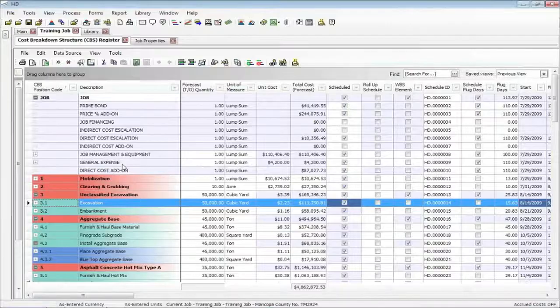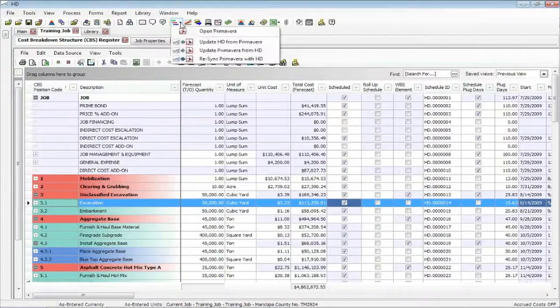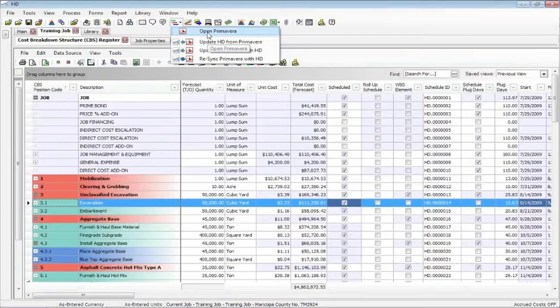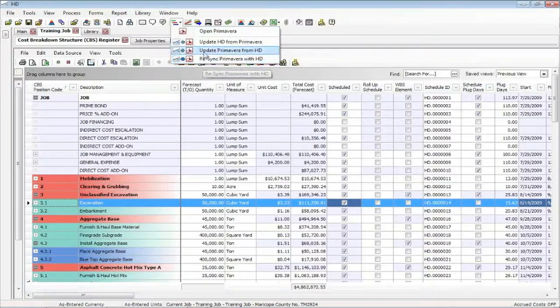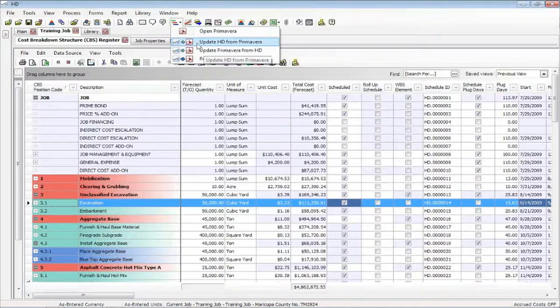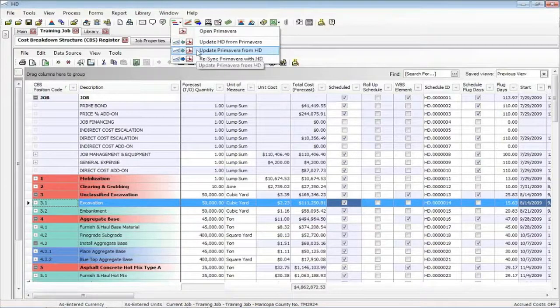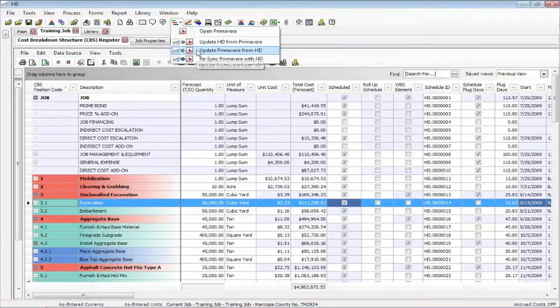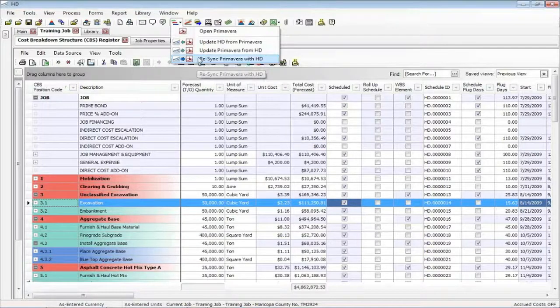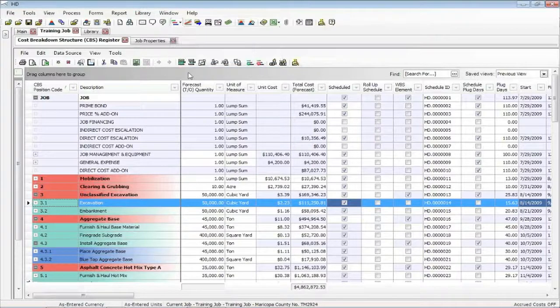I'll go back into Hard Dollar. Currently, to get out to Primavera, you would simply say open. It opens up Primavera. The update Hard Dollar from Primavera brings the dates back. Update Primavera from Hard Dollar will update the labor unit costs and the rates. The re-sync is all those other switches on the Job Properties Form Schedule tab. So there's some options for some updates that make sure that you're connected with Primavera.